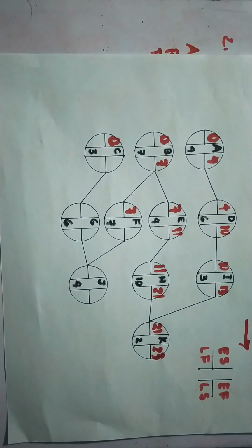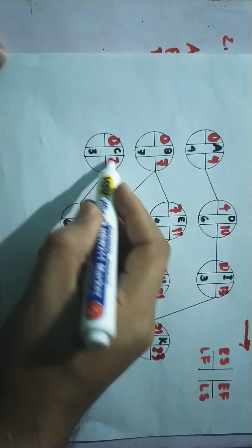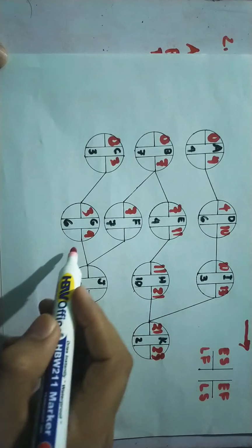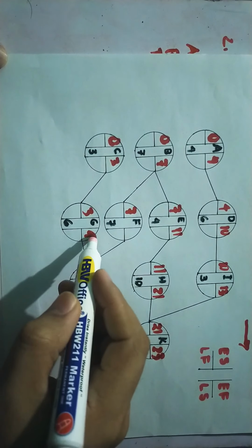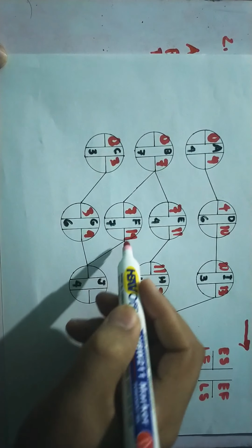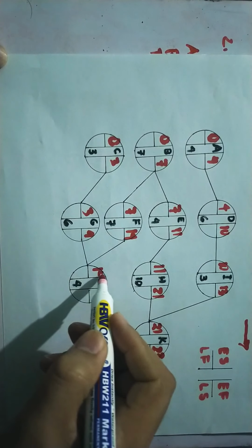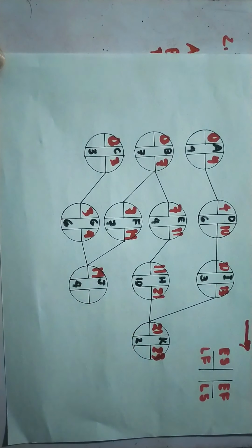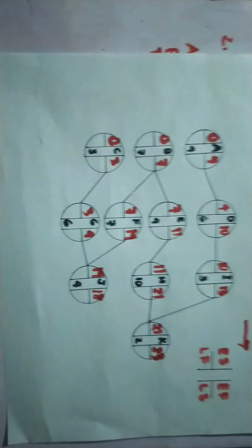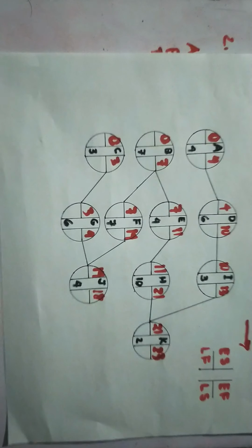Okay, so this one, 0 plus 3 equals 3, and then we copy 3. 3 plus 6, that is 9, and then copy, oh wait, we will wait for this one, 7 plus 7, that is 14. This is 9, this is 14, so we will enter here 14, the largest number. Okay, so 14 plus 4, that is 18. Okay, sorry.